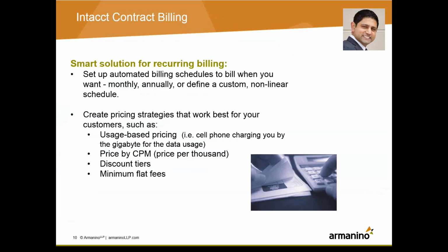Part of the contract billing as well is the ability to handle fixed fee arrangements a little bit more flexibly. So for example, if you do have fixed fee billing, you can schedule it out over a certain set of time. You can actually specify the start and end dates for the billing. It's no longer a rigid recurring billing structure.